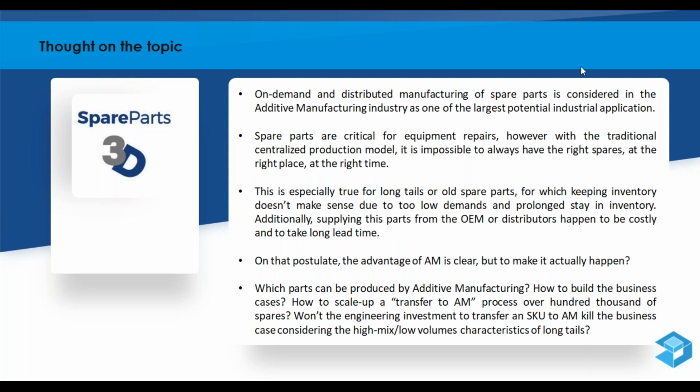So you're trying to find the least bad solution that you can get. And you are very often limited by the fact that your supply chain for spare parts is not specifically built for spare parts. It's built for first-time manufacturing, and therefore is sometimes, and very often, ill-adapted to produce low quantities on demand and deliver them quickly. So you end up with high MOQs, minimal order quantities. That's the case especially with plastics. You end up with high lead times to delivery when we are talking about on-demand order production, which makes it a complex and very interesting field for on-demand production with AM.